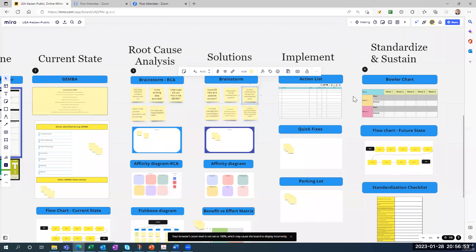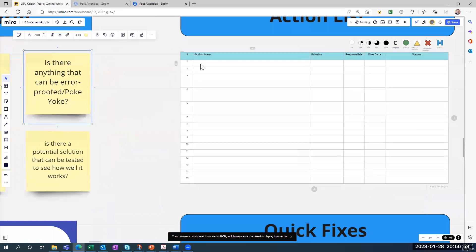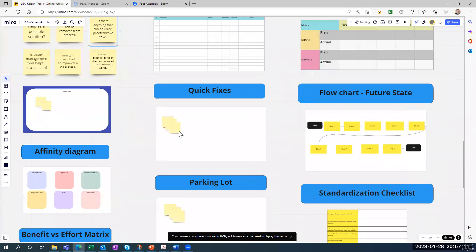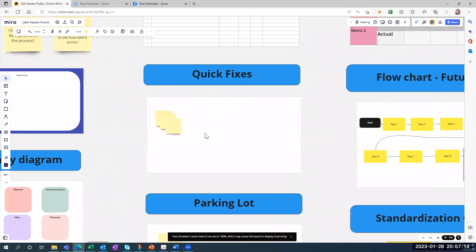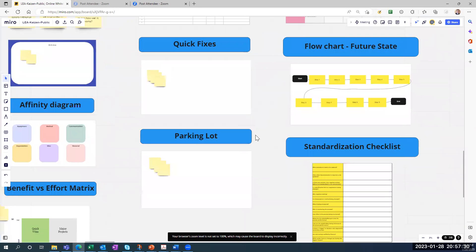At this point you know which solutions you'll be doing. The next phase is to implement — this is where you list the actions you're going to take. It's an action list: you type in the action, add priority if you want, who's responsible, the due date, and status. You can also use the symbols up here if helpful. There's also a quick fix section for things you can get done fast, and a parking lot section for ideas you don't want to lose but won't tackle in this Kaizen — maybe saved for a future event.